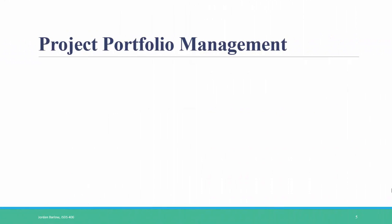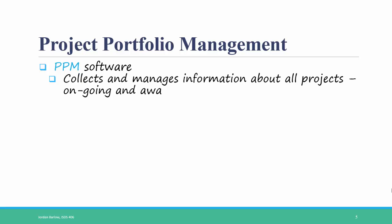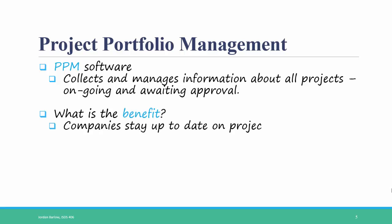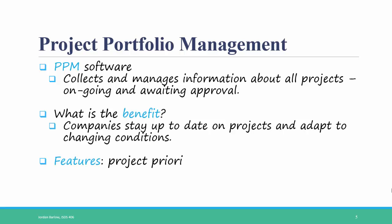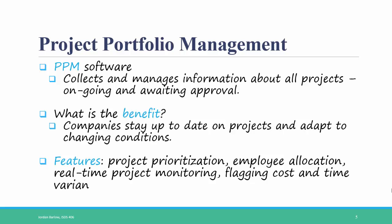To more carefully manage the project portfolio, some organizations utilize PPM, or Project Portfolio Management software. This software collects and manages information about all of the projects, both ongoing and those awaiting approval. The benefit of using PPM software is that companies stay up-to-date on their projects and adapt to changing conditions. PPM software includes features such as project prioritization, employee allocation, real-time project monitoring, flagging cost and time variances, and monitoring economic feasibility.